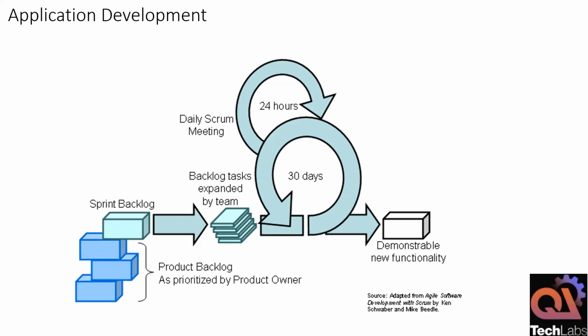They will define something called story points, and then they will take it into that timeline, and every team will take that as a goal for the 2-week or 3-week interval, and they will come onto the floor every day and initiate something called a daily stand-up, right? Typically the team who is going to take up the work will come and talk about the plan they have for that particular day, and what are some of the continuations they are going to do, right? So they will take a call every day, and every day there will be a measurement.